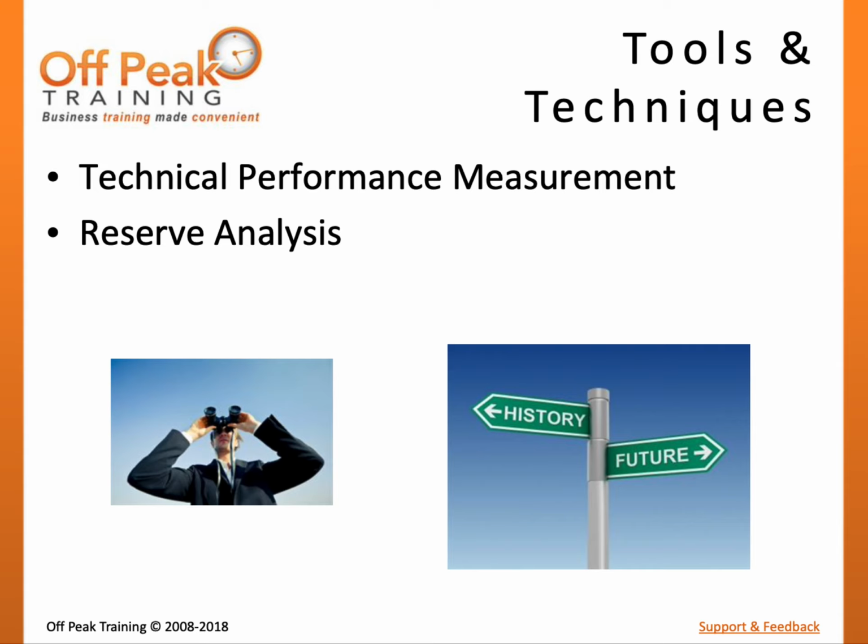Combined, this risk reassessment is essentially the continuous maintenance of the risk register. The project team must be on the lookout for new risks. In some instances, risks will arise in a project that could not have been anticipated earlier. These are known as emergent risks. Additionally, the estimated probabilities of already identified risks can change over time.